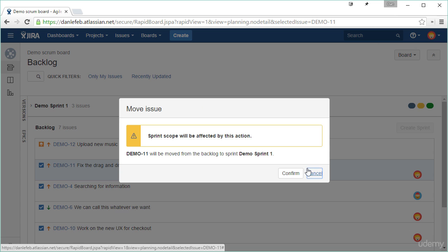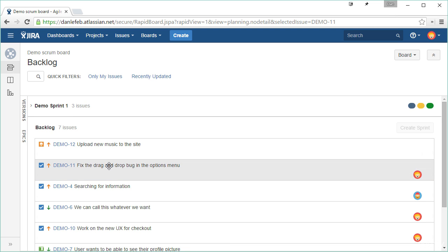Because if you agree to do these three issues, and then you start adding more things in the middle of the sprint, your reports are going to be all messed up. The estimates for what you thought you could get done in that sprint are going to be all messed up. And so ideally, that's something that you will go to your team lead or your manager and really say, this is a higher priority. So-and-so asked me to do this. Is that okay if I take something else off, put this on? Or if you think you can get both done, that's great. But that's really just a discussion that needs to happen.